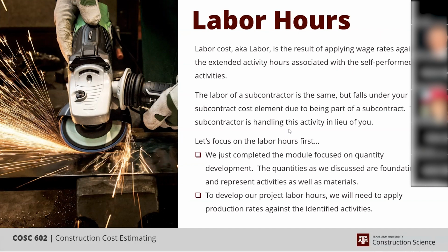Primary reason is that you have to manage the subcontractors, and the best way to try to figure that out is know how many craft hours are on site and when. So even though they don't impact your indirect costs like self-perform craft do, they still impact your indirect costs in some manner.